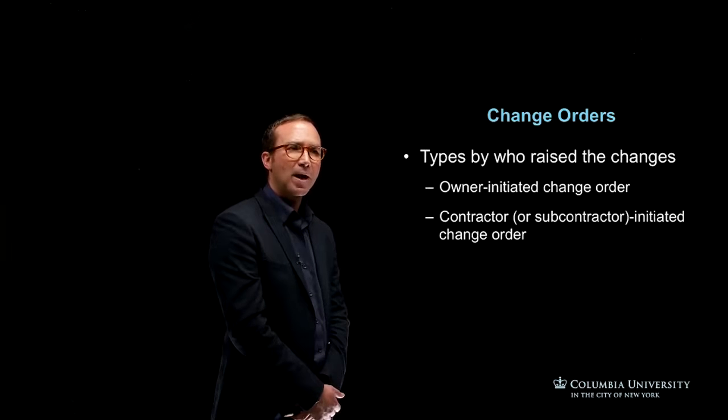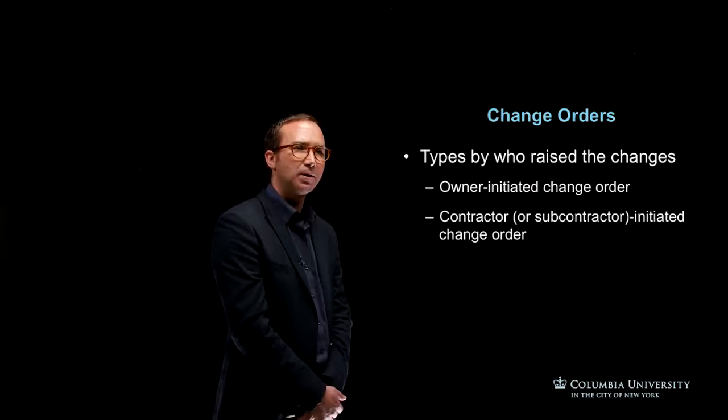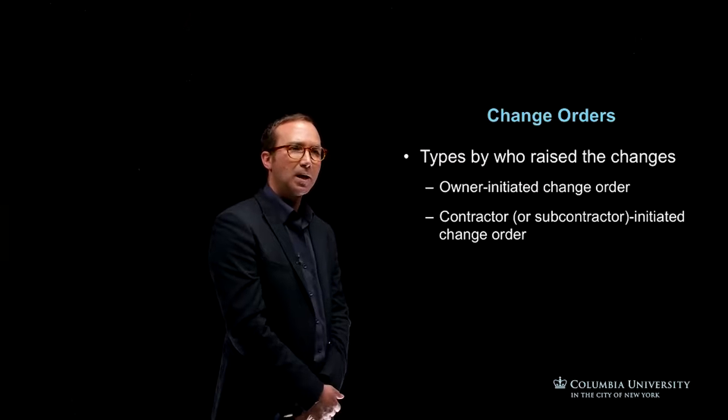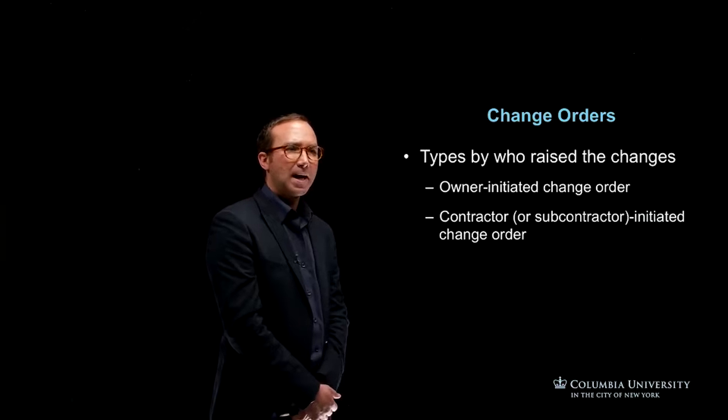And then you have contractor or subcontractor initiated change orders. So that could be they want to use a different type of material, or working with the design team, they've realised actually the logistics of that design for that particular component of the build does not work. So they are therefore suggesting something else.